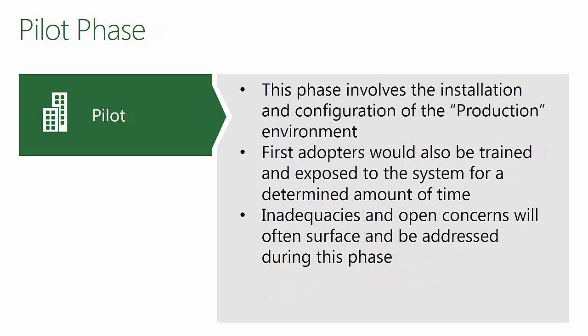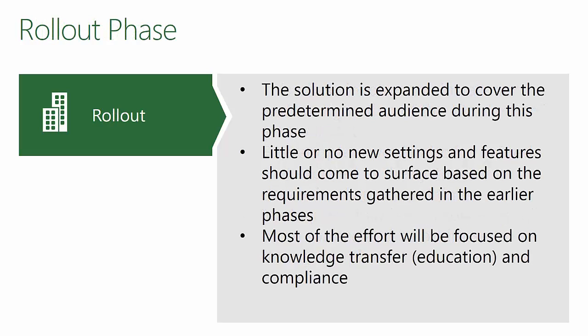From here, we move into Pilot. At this point, you want your first adopters trained and working with the system, testing the configuration settings and identifying your production and development environments. From Pilot, we freeze any of the configuration settings — basically making those changes discovered during Pilot — and we want to surface any issues or changes that need to be made.